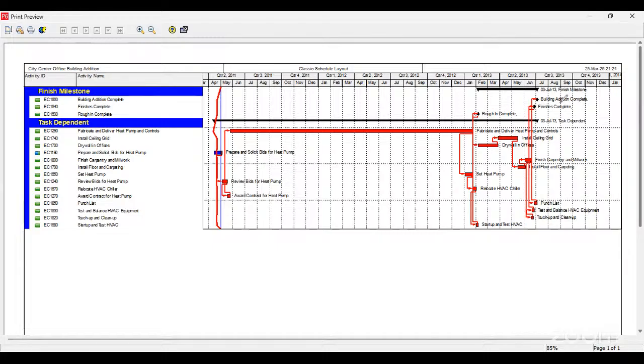What's happening here is a milestone, and it is directly connected to the punch list, which is this. So if there is a delay in our first activity, there's definitely going to be a delay in this activity. So all the activities here are critical. They are all related.